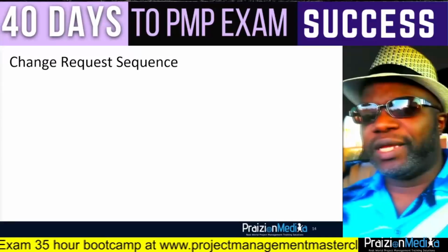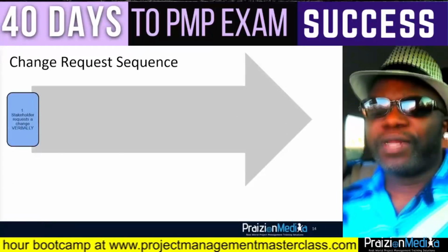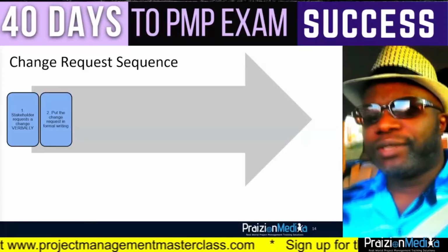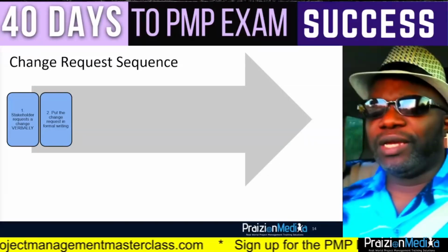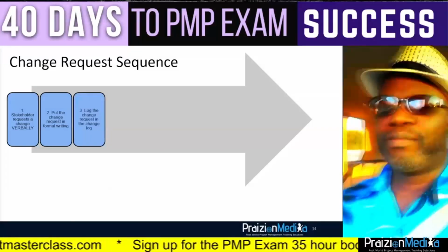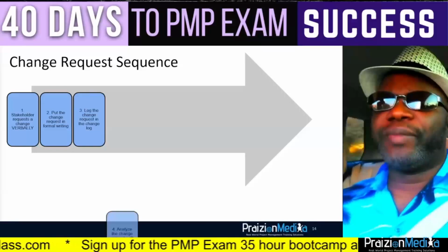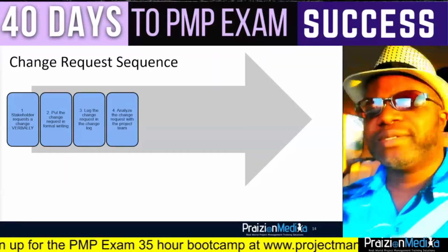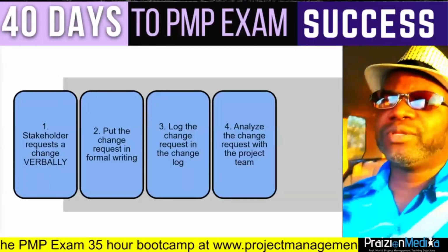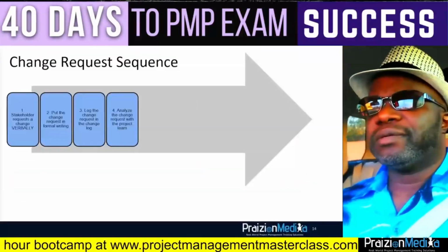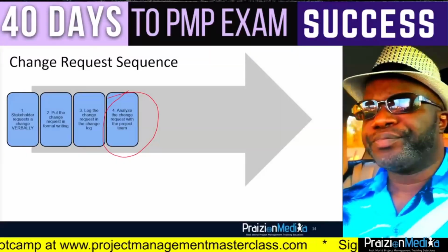After you have filled in that change request form, the next thing that should happen is the project manager and the team should analyze that change request form and get a better understanding of what is being asked, do some analyses, try and get down to the bottom of what exactly the customer wants.